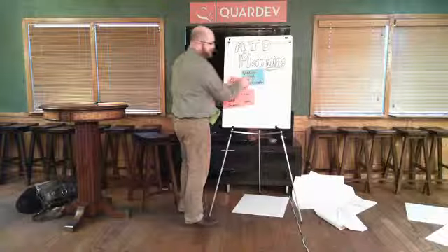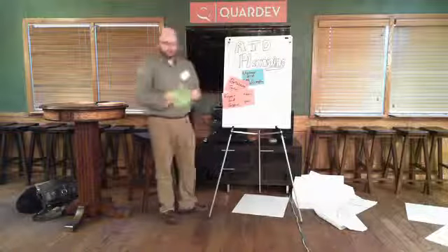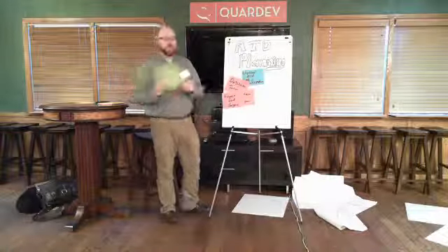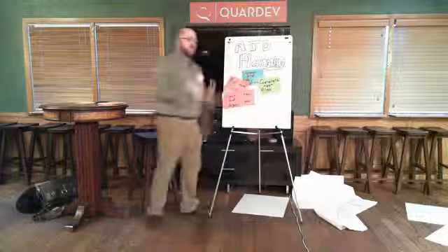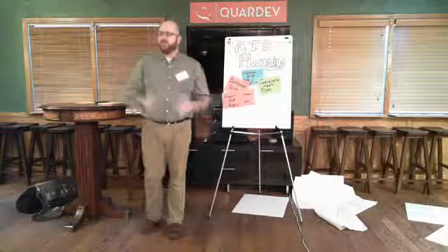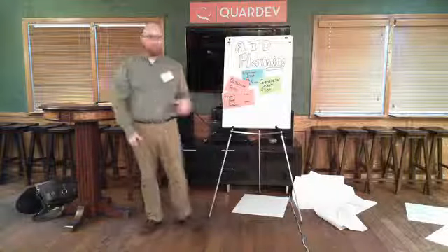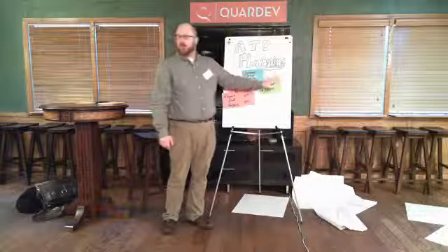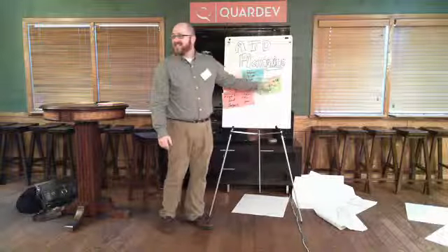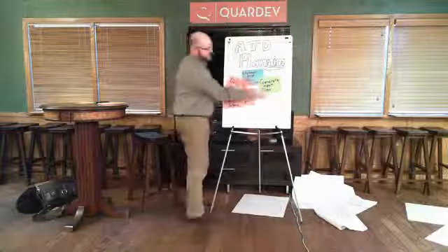And it's not like this test comes for free. There may be some work for the quality assurance folks as well. This is to generate some test files. If you want to upload something, what do you want to upload? It needs to be a legitimate file. There's some work for me there to have a few options. I may create a more detailed test plan than this. There's some work to be done to do this test, right? So we put those together.